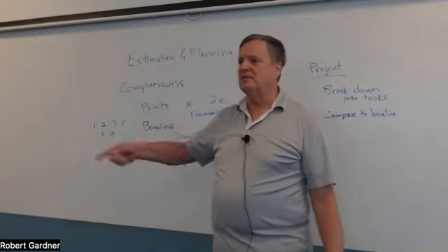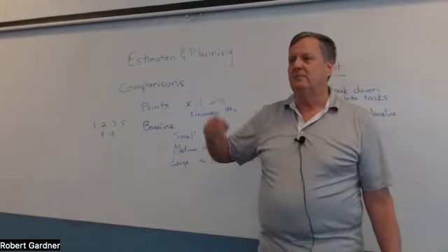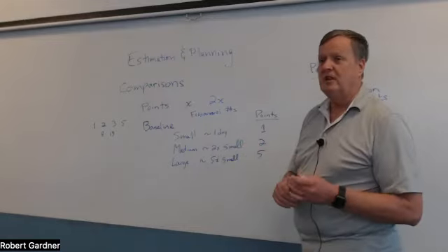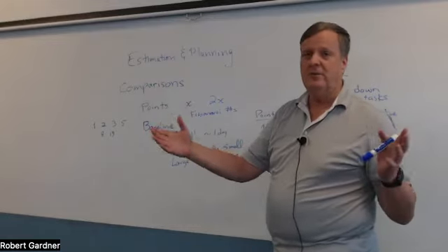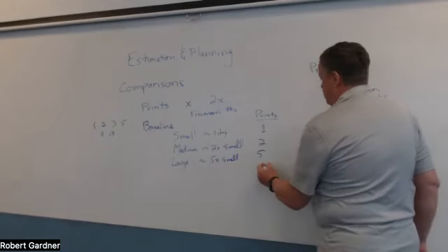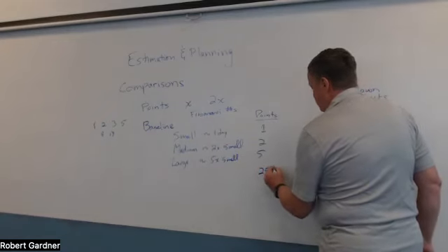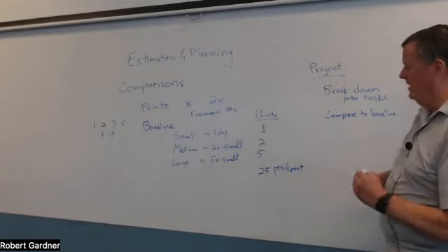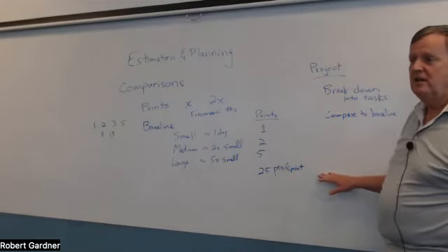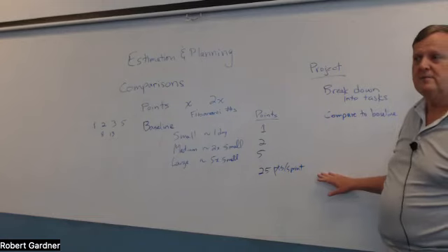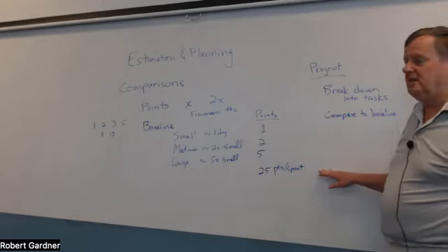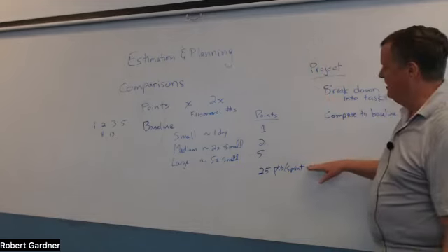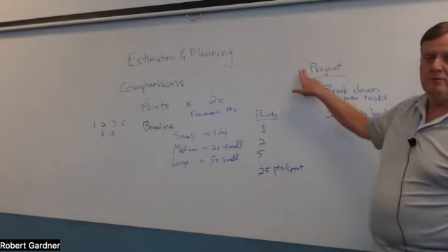You do that for a few cycles, and pretty soon you figure out how many days it takes to complete a point for the team as a whole. You never do it on an individual basis. It's for the team as a whole. So say our team is doing 25 points per sprint. If I have a 60-point project, how long is this going to take us? How many sprints? Yeah, 3 sprints. It's 2 and a bit, so 3 sprints. You always round up, always round up. So this is now a 3-sprint project.